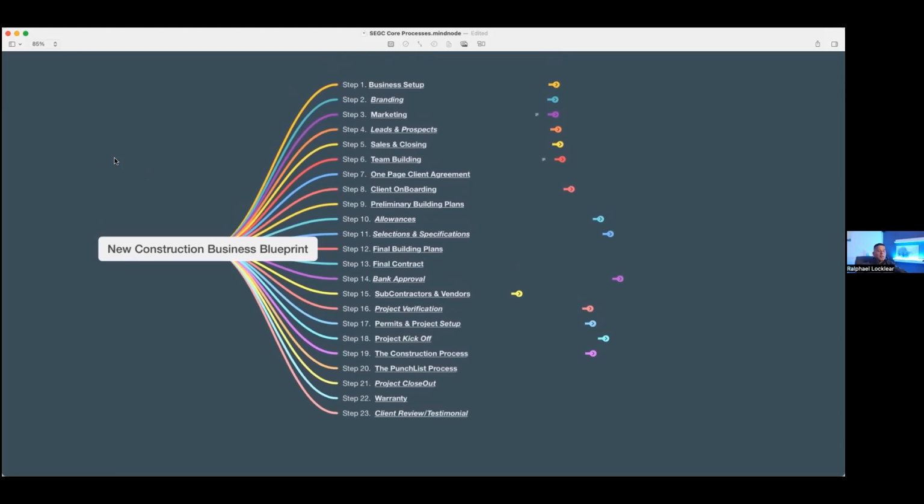Yes. Those consistent routines are simple. Whenever you're dealing with people, in our case, subcontractors, no matter if it's the footing subcontractor, the foundation subcontractor, the electrical, plumbing, HVAC, every subcontractor, the thing that helps us the most is before they start that job, any job, myself or one of our team members will go the day that they start. They don't start any work until we do a job briefing with them. That job briefing is recorded also on video.